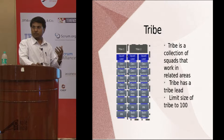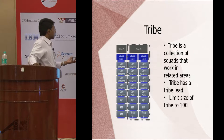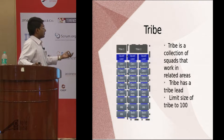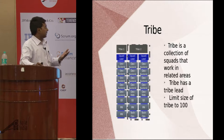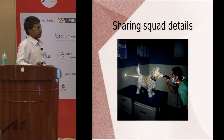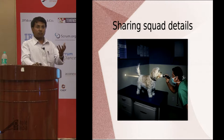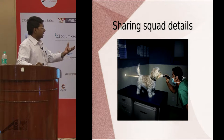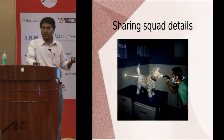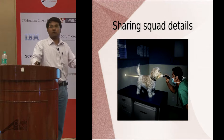Moving on to a bigger organizational structure called the tribe. The tribe is responsible for a major portion of the software, with all squads related together. A tribe can consist of two squads, three squads, or even a single squad, and the size of the tribe is limited to 100. The squad has to be as transparent as possible so everybody knows what the squad is doing and how their work affects others. We want to minimize dependencies and maintain a highly transparent and open system with no hiding of information.